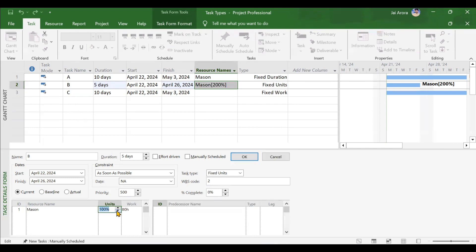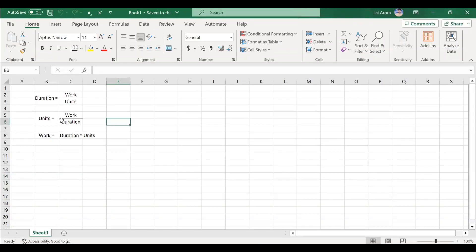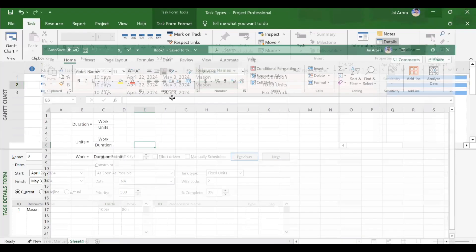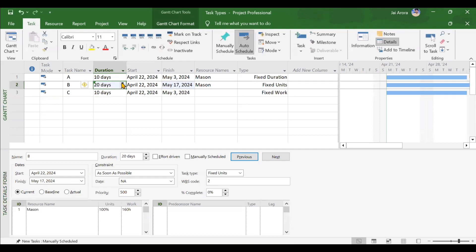Resetting to 100%, third case for fixed units: increasing duration to 20 days. Unit remains 1. Duration is doubled so work will double — that's it. Making it 20 days confirms work becomes 160 hours. The Mason will be working 8 hours each day for 20 continuous days.